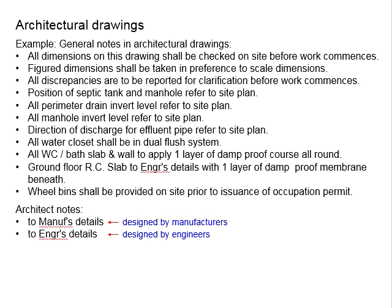Next: figure dimensions should be taken in preference to scale dimensions. This means that dimensions written in the architectural drawing — the figure dimensions — take priority. We know that architectural drawings are normally produced according to scale, but sometimes due to amendments the dimensions have been changed without converting into proper scale. This leads to contradictions between the figures shown and what you measure with a ruler. In case of such contradictions, the figure dimensions are the ultimate reference.